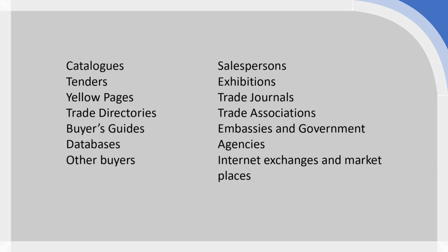You'll find industry specific catalogs, typically now industry specific websites and industry publications which contain various adverts and supplier listings. You could go out to tender. So tender would be the announcement of a procurement process placed on a website. This is particularly used for government contracts which go out to tender on specialist websites, government websites, where the responsibility or the onus is on the suppliers to check, but it is publicly posted.